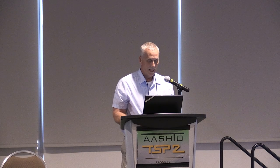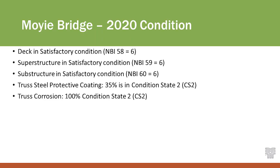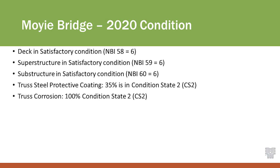Based on the 2020 desktop review we conducted, the bridge deck was found to be in satisfactory condition, corresponding to an NBI rating of six, as was the superstructure and substructure. Diving a bit deeper on the protective coating for the truss: what was reported was a condition state two for 35% of the coating — in fair condition. This indicates the coating system is at the end of its useful life. At the time, it had about 55 years of life, which is excellent for painted steel. Some truss corrosion was beginning to develop.